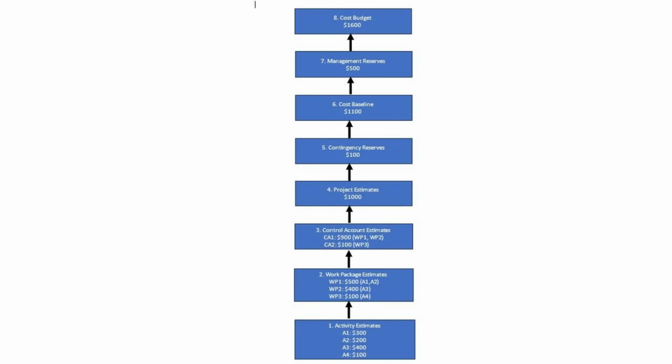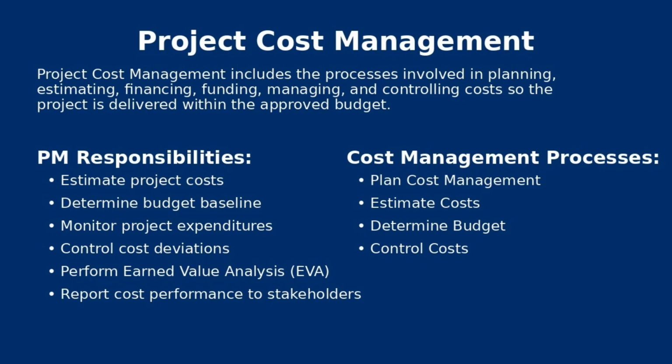In addition to the cost baseline, you're going to add management reserve, and that will give you the project budget. Once you have determined the budget, your job is not over. You need to see whether it's as realistic as possible, as accurate as possible. You need to refer to the historical information, check with experts. You need to do a funding limit reconciliation.